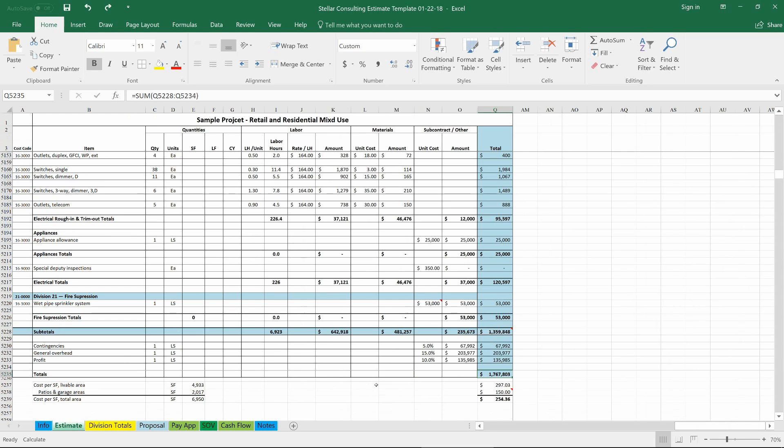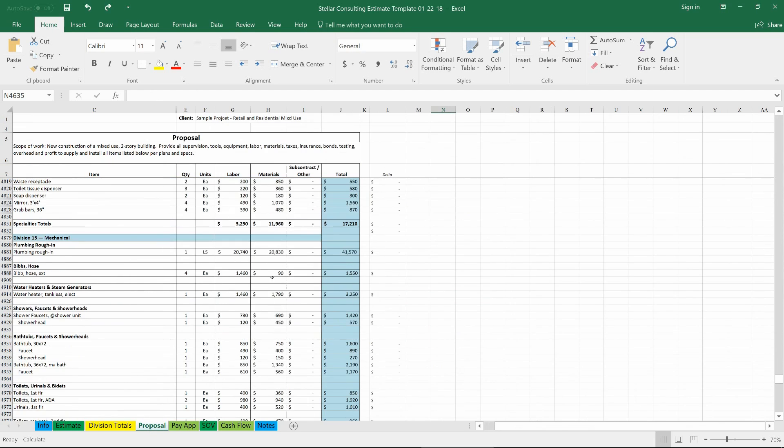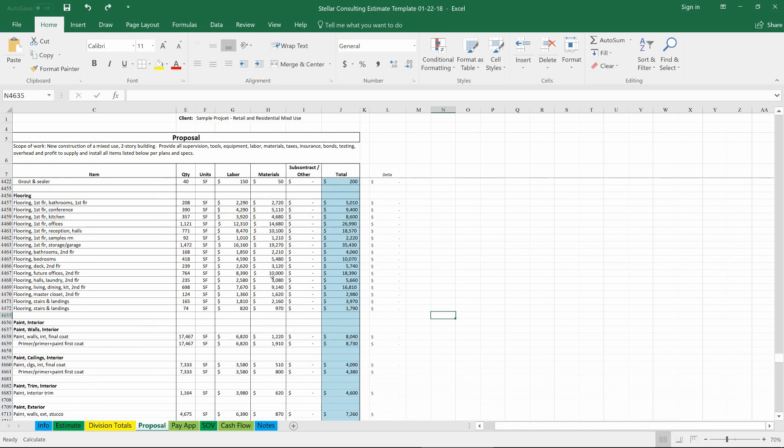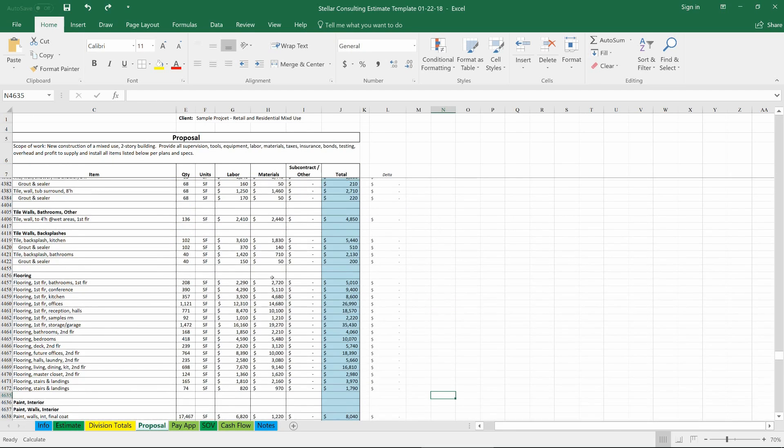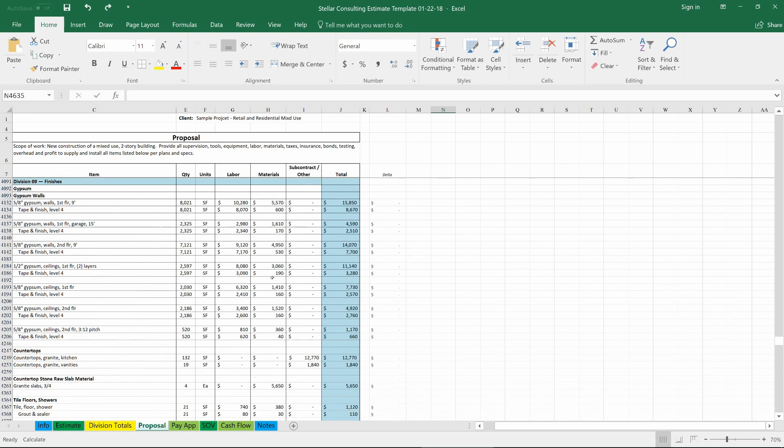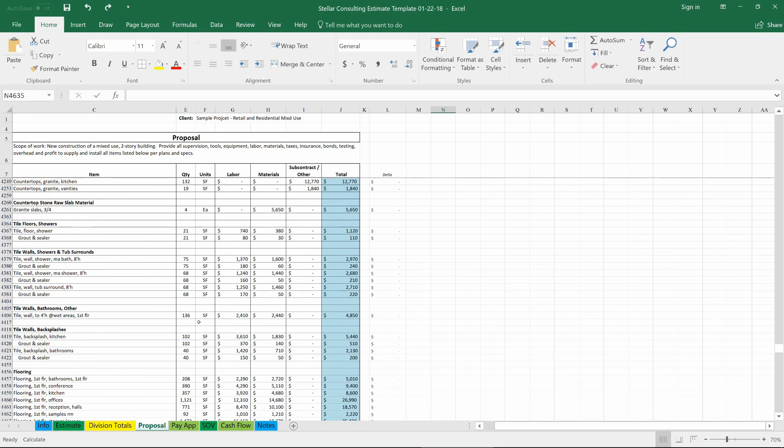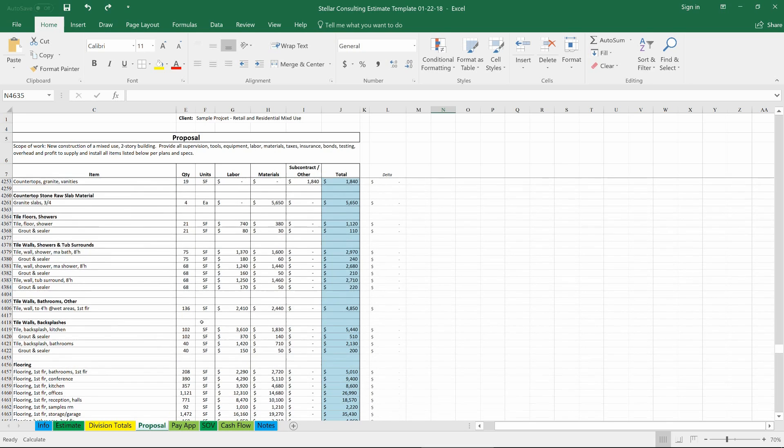So like I said this is a great tool to be able to work with clients and show them exactly where your costs are at. Now as far as that is concerned many of my clients end up using this tool and the proposal you can see that I use the proposal with virtually full information full exposure. The only thing that isn't in here are the general conditions and overhead contingencies and profit and those are all built in proportionally. But otherwise it's an extraordinarily relatively speaking and extraordinarily transparent proposal and method.